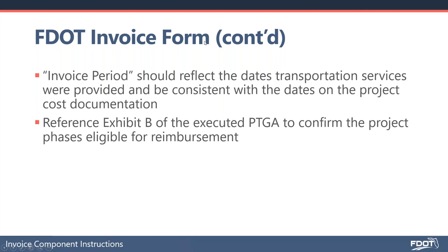I know it's difficult for a lot of us to remove ourselves from that mindset because we've been submitting backup documentation for so many years and reviewing it. But since the district financial services is encouraging the department transit not to include backup documentation, if we reference any dates outside of the service periods, it can lead to confusion from the reviewers on the financial services side. And that will almost ensure that the invoice gets pushed back.